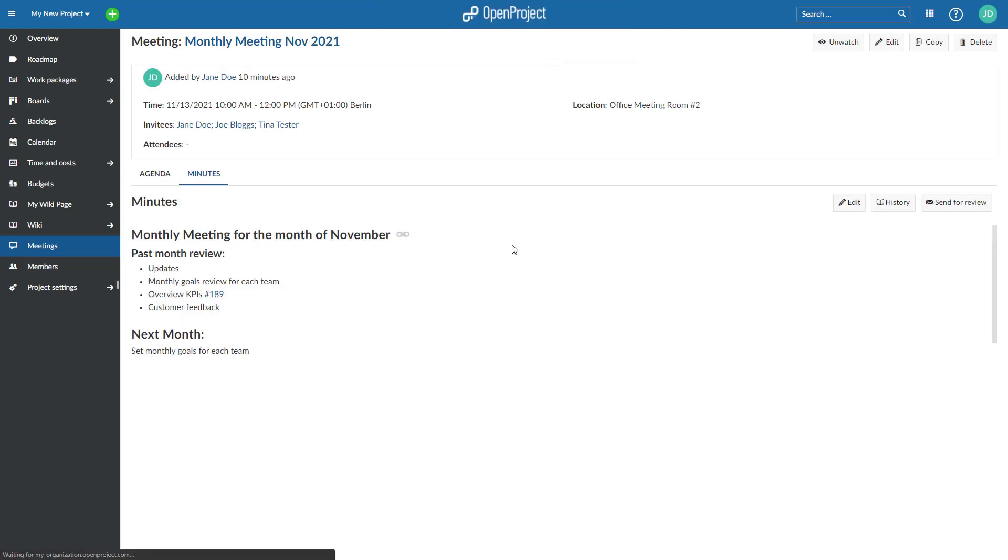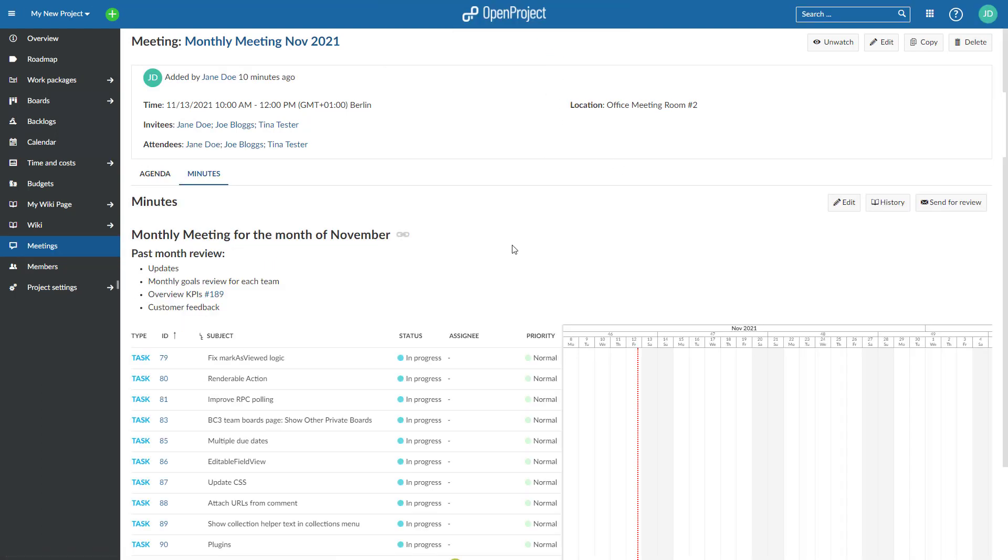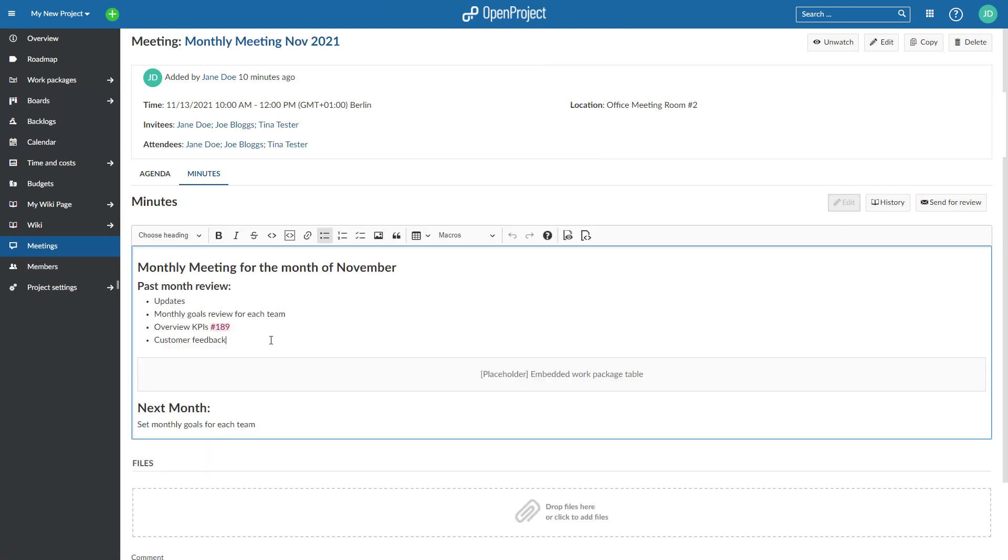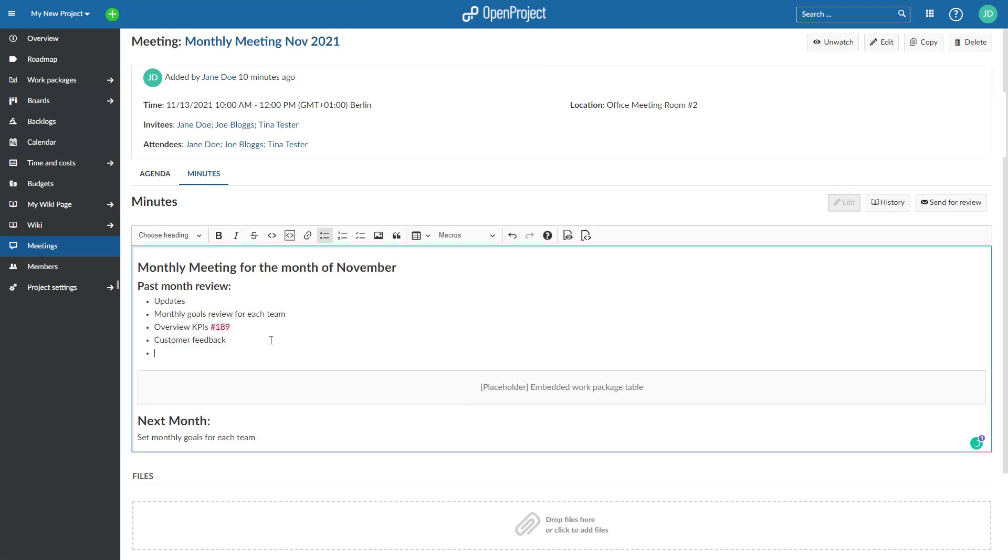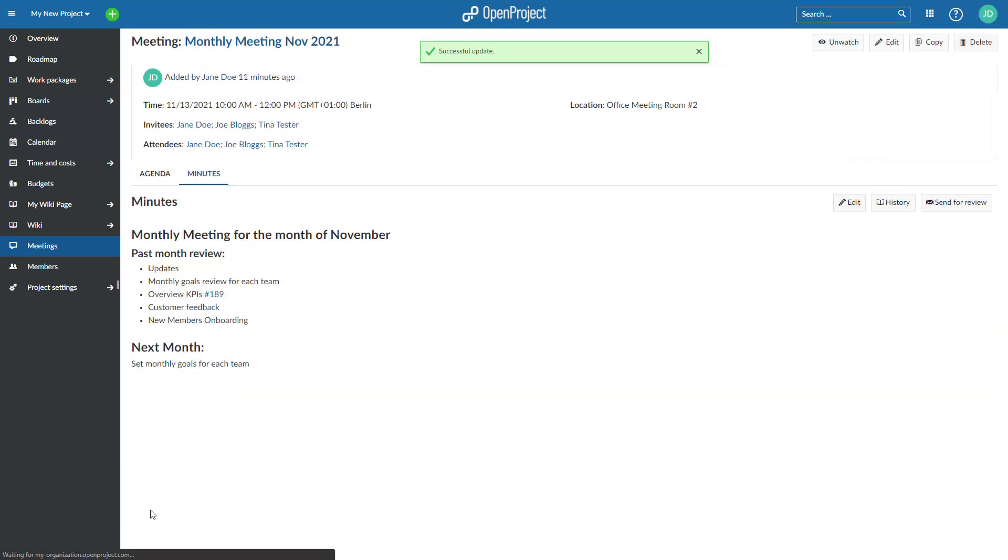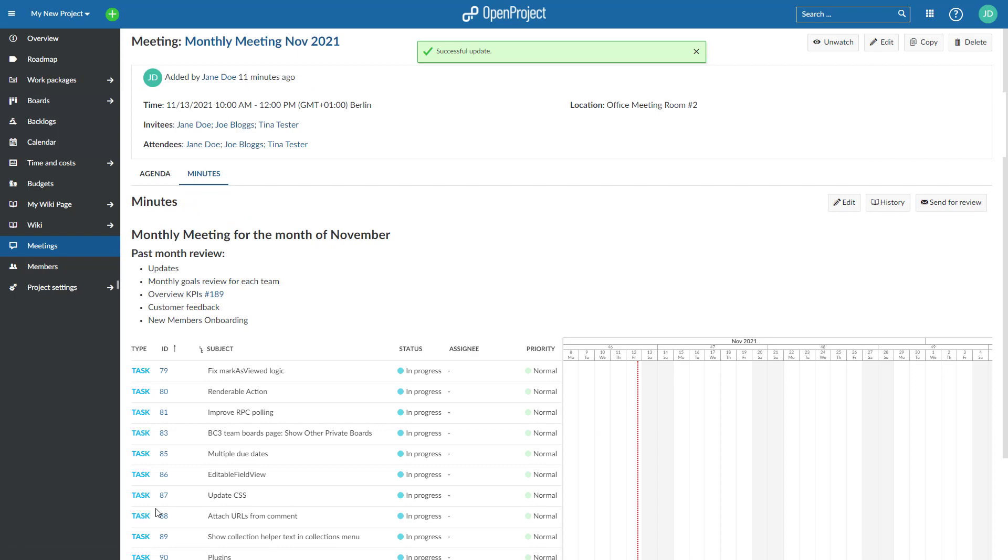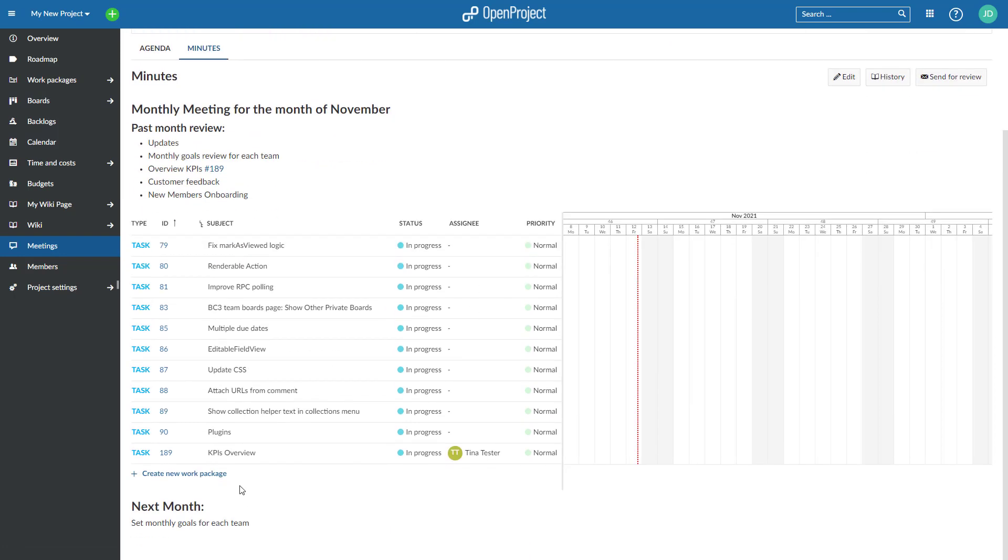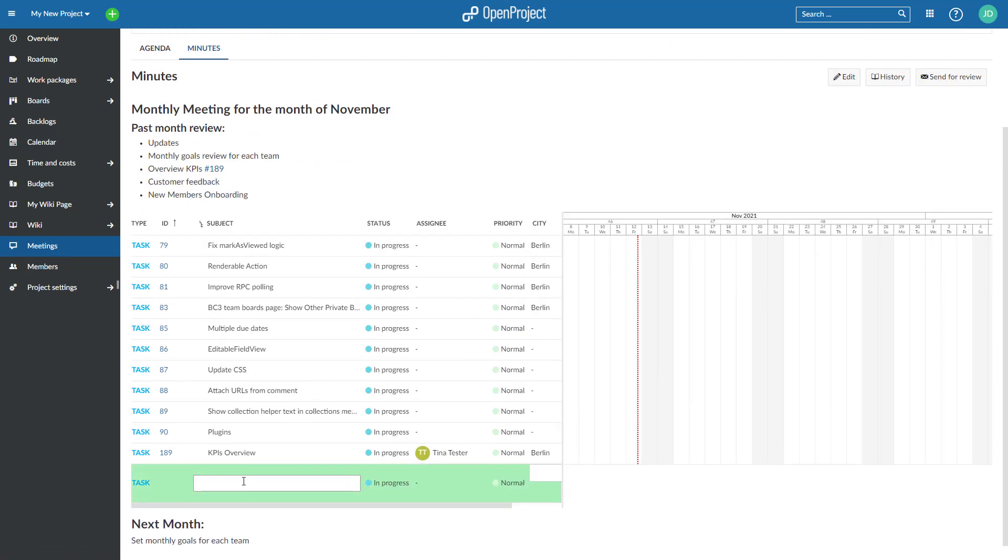OpenProject automatically generates a template for meeting minutes out of the agenda. During or after the meeting, you can directly include all decisions and action items. You can even create new work packages directly from an embedded work package table, for example, to track tasks and assign them to team members.